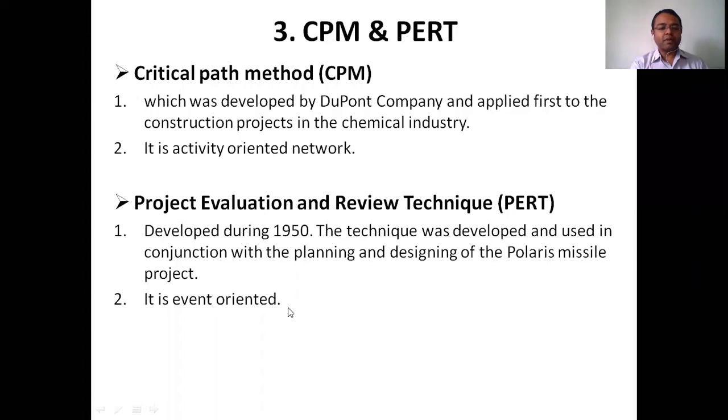First of all, you have to go for cleaning of the site. Next, we'll go for line out. After line out, we'll go for excavation. After excavation, we'll go for the concreting of footing. Next, concreting of column, then concreting of the ground beam, and we will erect the wall up to the plinth level, and next we'll fill that part up to the plinth level. That filling will be done by the murum.